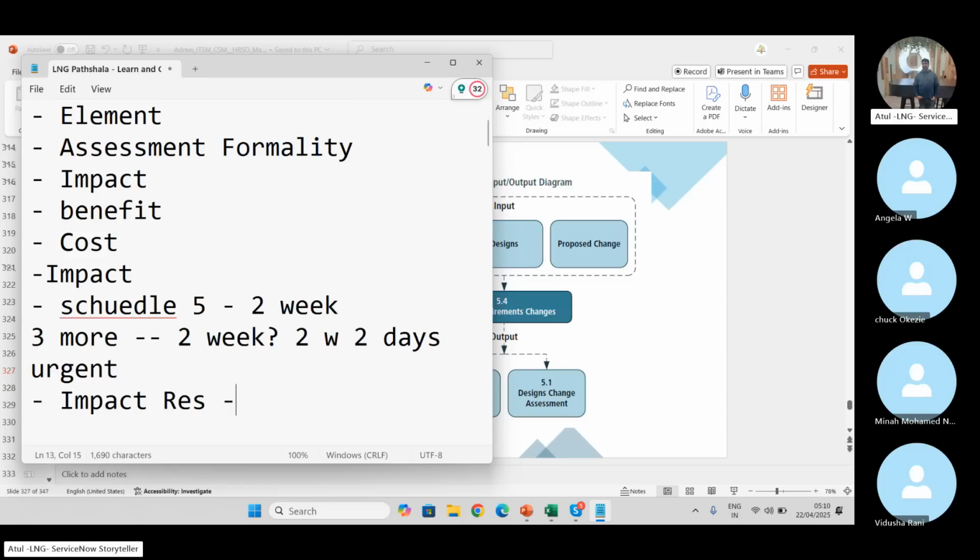In this particular part, we have to reach out to our stakeholders, as defined in the governance process, to get it approved. I, as a business analyst, can give these inputs. But my business, my stakeholders, need to decide whether they are okay to approve it or not. As I said, if a change comes after the 2 weeks of the requirement freeze, it needs approval from the head of department.